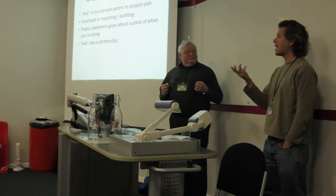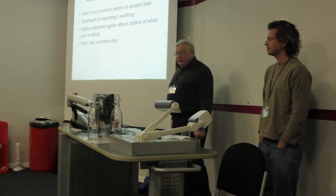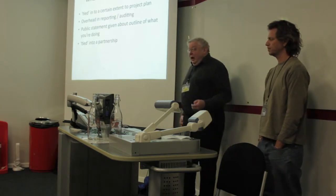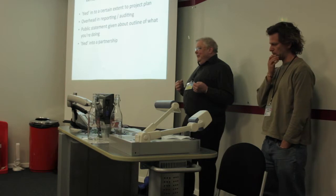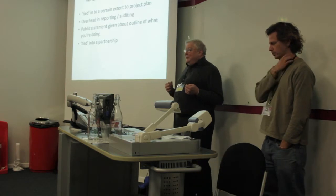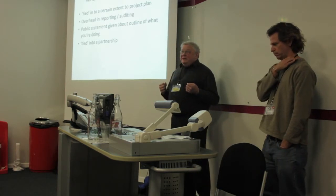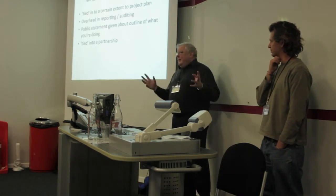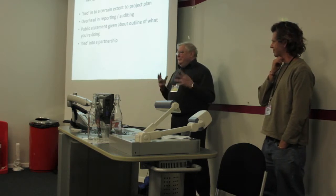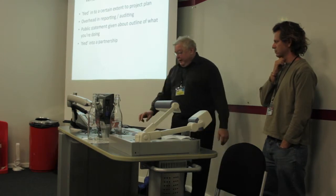It doesn't have to be open source — it can be closed. The technical details, the secrets, the real guts of it don't have to be public, but the overview has to be. Also, you're tied into a partnership. You start a three-year project working with companies X, Y, and Z. Eighteen months into it, you can't say to company X, we don't like working with them anymore, off you go — because that crashes the project. It's like being in a temporary marriage.